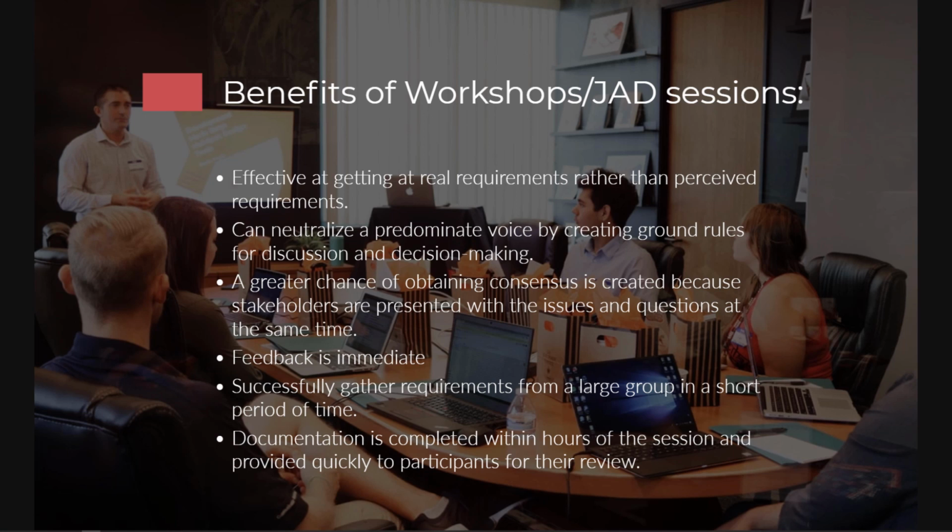I always make sure that, for example, if there is a 3-day workshop, at the end of each day, I'm documenting what came out of that day. I'm sending it out, and then the next morning before we start the meeting, the first thing we do at the beginning of the meeting is to go over the information from the day before. So that way I'm able to get immediate feedback on any of the notes that I took in case there's anything that I misinterpreted.